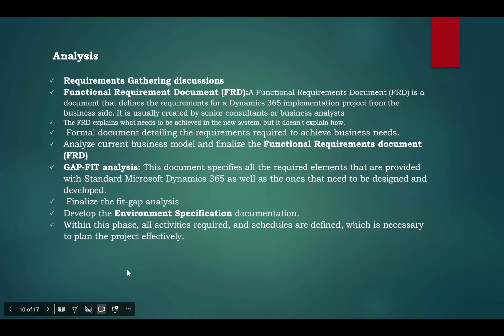Even though we have agreed initially from the higher level, later once you deep dive into the requirements, then only you'll understand whether that is available or not. Most of the times we will try to give some higher level input during the pre-sales itself. But later, once you understand the actual requirement, few changes might happen here and there. So that's the reason we'll consider this as a gap fit analysis.